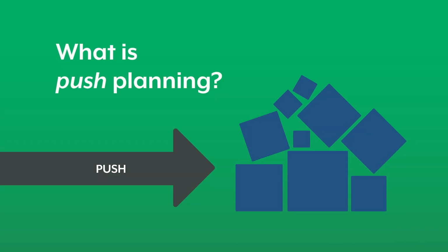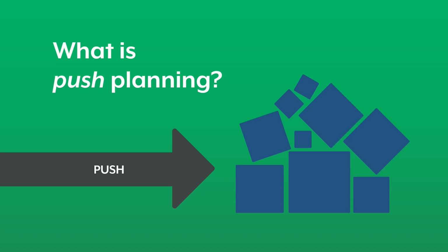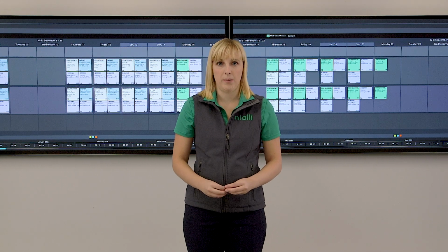Push planning is the approach that most conventional construction projects follow. Tasks get ordered sequentially based on a predetermined timeline on the project, and this is often set up by a central scheduling team or a project manager. So when projects are predictable, this approach to planning makes a ton of sense. Everyone knows where they're supposed to be, deadlines are clear, and control can be centrally managed.